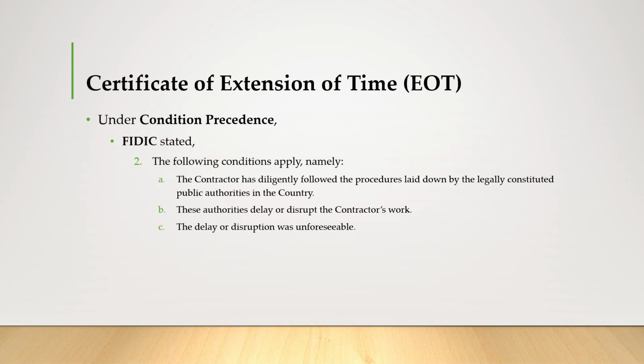And second, the following conditions apply, namely, the contractor has diligently followed the procedures laid down by the legally constituted public authorities in the country, and then these authorities delay or disrupt the contractor's work, and also the delay or disruption was unforeseeable.